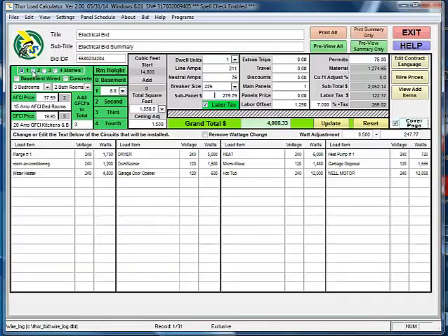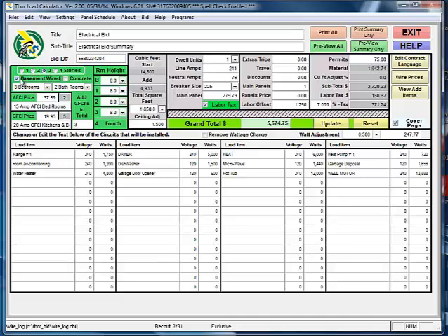You need to select the number of stories, whether or not it has a basement that's going to be wired, and if the basement has concrete walls, the number of bedrooms to be wired, the number of bathrooms. Count a half bathroom as a whole. So if it has 2.5 baths, choose 3. Select whether you have 15 amp AFCI bedroom protection or if you wired it in 20. Most common is 15 amp AFCI bedroom breakers.